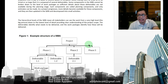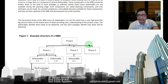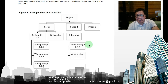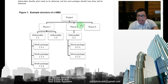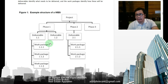Some components in the WBS cannot be broken down to the level of work packages because sufficient details are not available during the planning stage. These are called planning components — only estimates can be made. As the project progresses, more details become available and these components are updated and decomposed into smaller activities. The hierarchical level of the WBS means all stakeholders can see the work from a very high level — the big picture — down to the lowest level of detail.